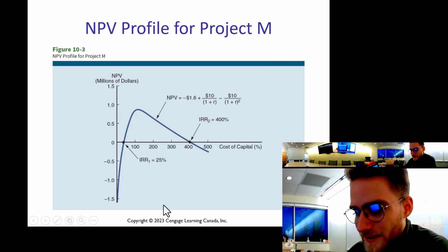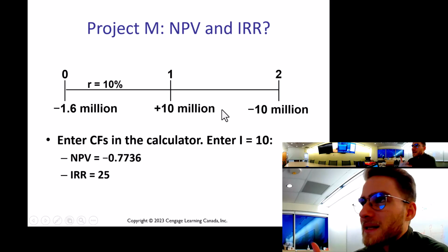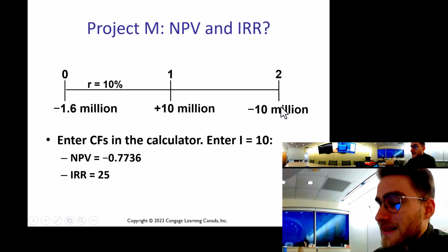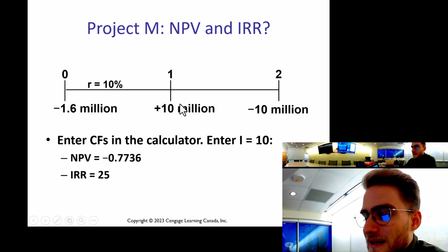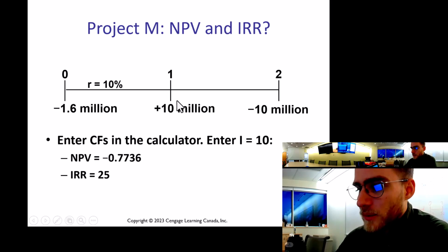And what's happening is, in this previous slide, as we crank up the discount rate, this future outflow is worth less and less, and it's getting discounted faster than this inflow, right? Because this gets discounted twice, whereas this inflow only gets discounted once.